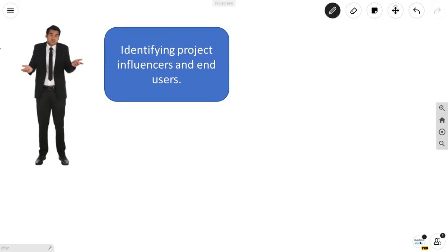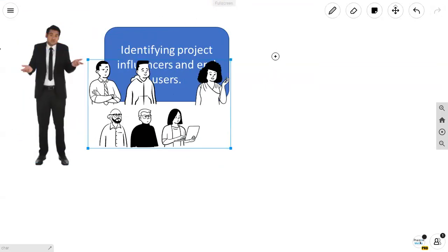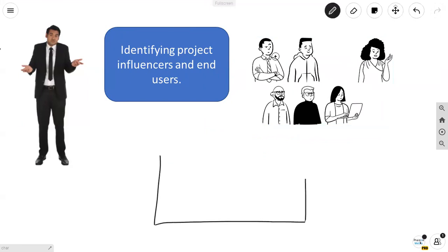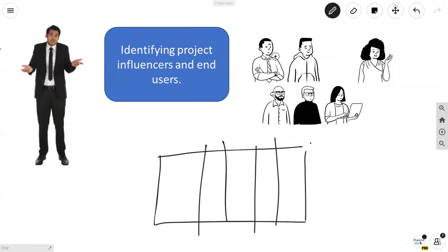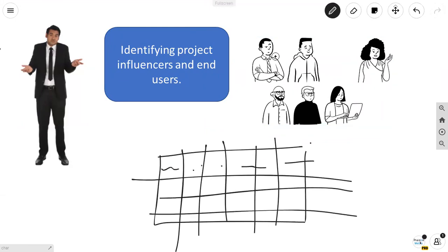They've all got an opinion about what the software will do, and these stakeholders aren't very easy to work with — they can be a little bit difficult. Pradeep has started identifying these stakeholders and is going to put them into something called a stakeholder register — a tabulated document with stakeholder names and criteria such as the phase they're most interested in and whether they are positive, neutral, or resistors.